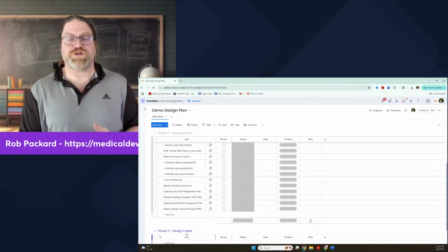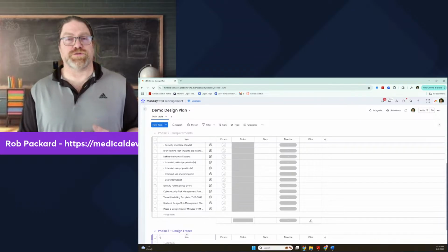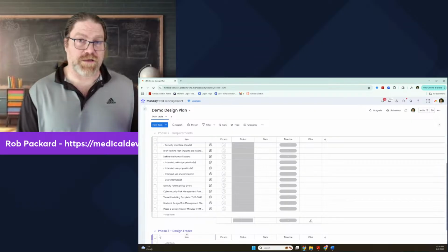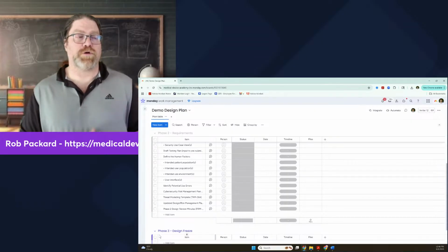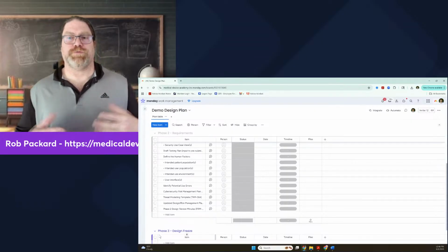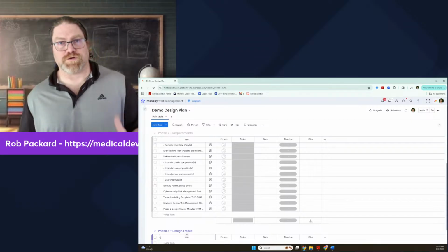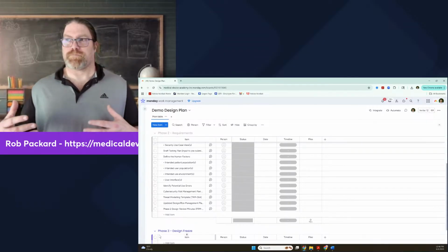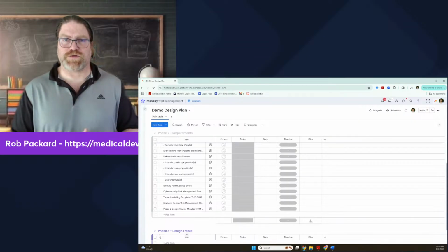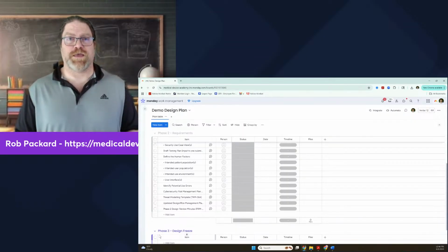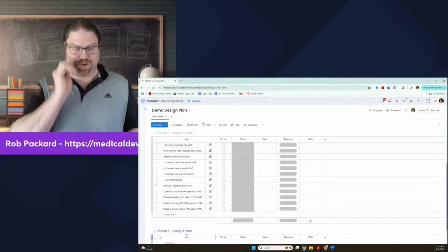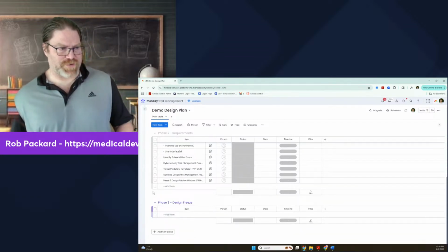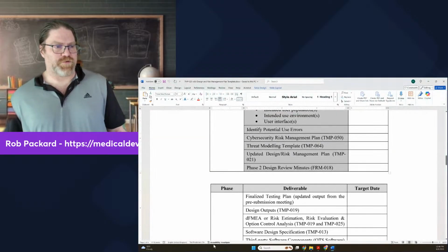So in this phase, you might do formative testing for usability. In this phase, you do a lot of your risk analysis. You've started risk analysis, but you're going to do a lot more in this phase. You would be doing your electrical designs. You'd be doing your software development, some software testing, maybe some evaluation with customers, focus groups to look at early versions of prototypes, that minimum viable product that everybody's looking for. So that's what you do in the design freeze phase or the third phase.